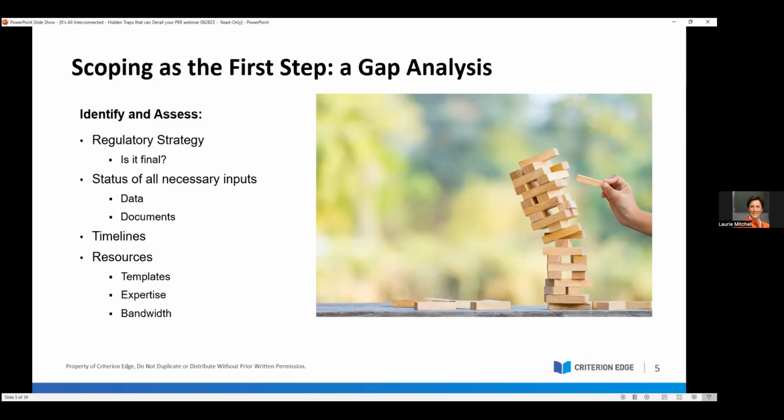You must approach this exercise of scoping where you are at the project level. You have a job to do. It's writing, let's just say, a PER or any other document, an SVR, a CPR. Approach this exercise from the point of view of the project, and in this case, the PER itself. Therefore, ask yourself, what inputs are needed to write that document, the PER? When are they needed by? And finally, will they be ready on time?